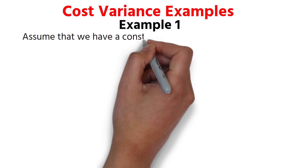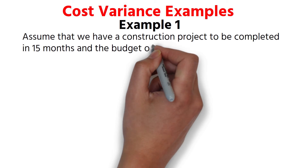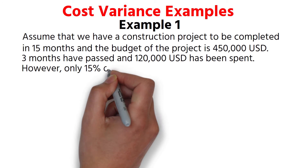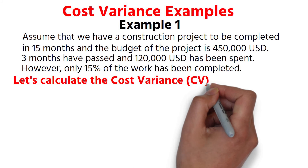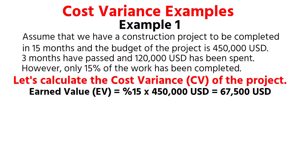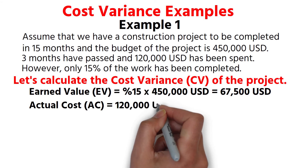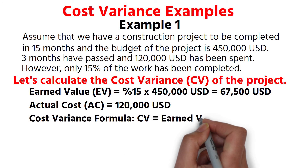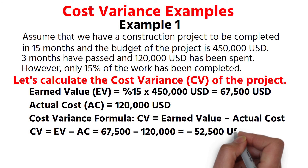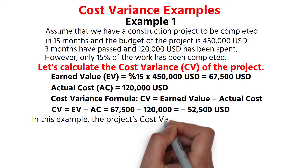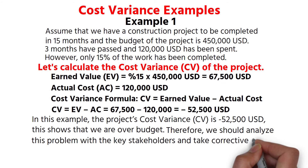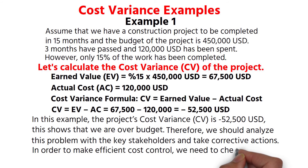Cost Variance Examples. Example 1. Assume that we have a construction project to be completed in 15 months and the budget of the project is $450,000 US dollars. Three months have passed and $120,000 US dollars has been spent. However, only 15% of the work has been completed. Earned Value = 15% × $450,000 = $67,500. Actual cost = $120,000. CV = EV − AC = $67,500 − $120,000 = −$52,500 US dollars. The project's cost variance is negative $52,500, which shows that we are over budget. Therefore, we should analyze this problem with the key stakeholders and take corrective actions.